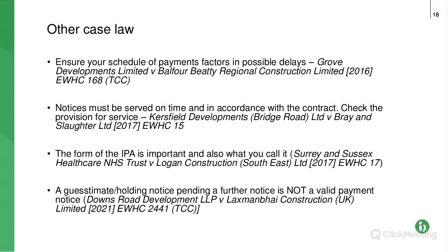And what the court said, it didn't state the sum that was due because it wasn't a statement of the sum that the paying party genuinely thought was due. They just plucked a figure out of the air, and that was evidenced by the fact that they said, we will look at this properly and provide a proper notice later on. So, have a look at that. If you're a contractor, be really careful about it.